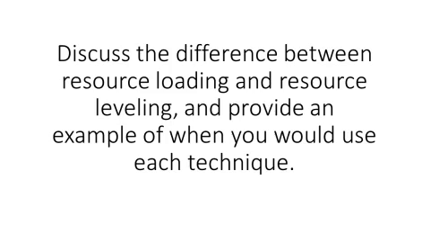Then you have resource leveling. Resource leveling is used for resolving conflicts by delaying tasks, in a form of network analysis where resource management concerns drive scheduling decisions and resources, including manpower and budget. The main purpose of resource leveling is to create a smoother distribution of resource usage. For example, you can sometimes remove overallocation by delaying non-critical tasks. At other times, you will need to delay projects completely to remove overallocation.